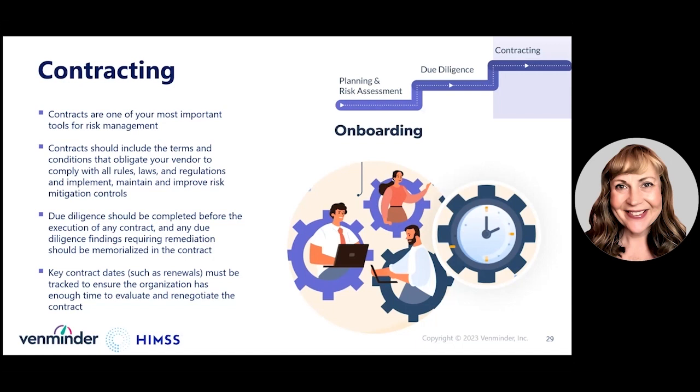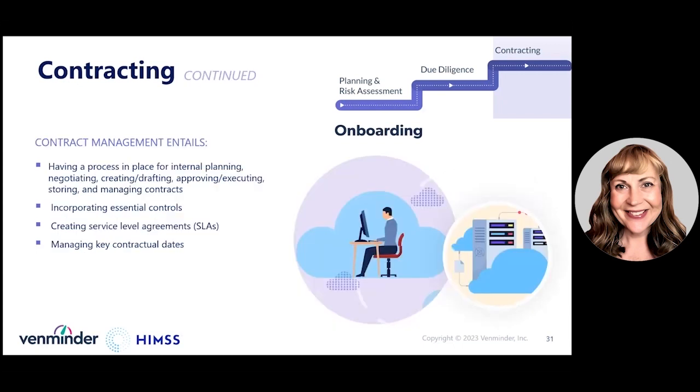It's absolutely imperative that your due diligence is completed before you sign the contract. If you don't do this and you find something pops up in due diligence post-contract execution, you basically have no leverage to compel the vendor to remediate the issue, and your organization will be saddled with unnecessary risk.